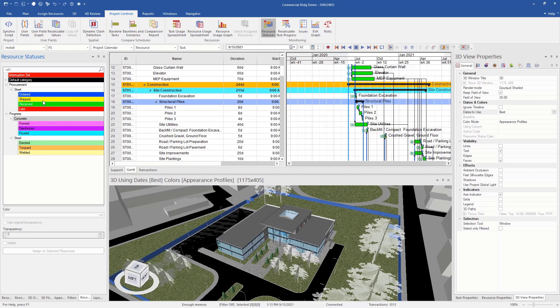As you can see here, we have a few that I already created. I have some procurement for steel, ordered, shipped, received and late. And then we have some progress statuses here for concrete. They're formed, reinforced, poured.